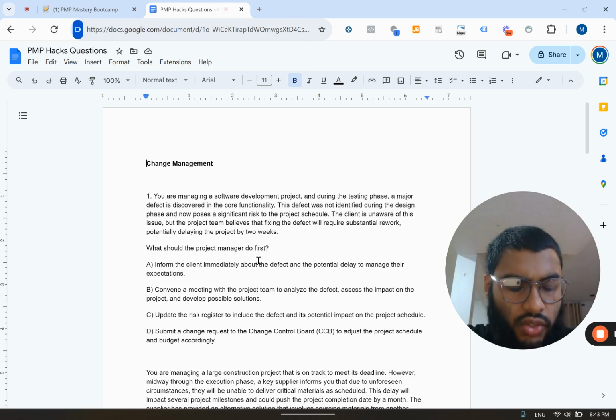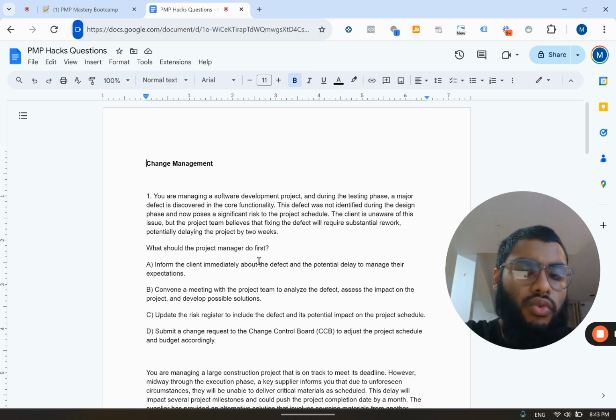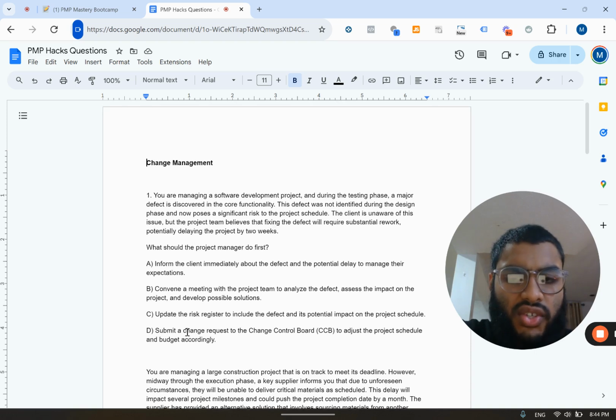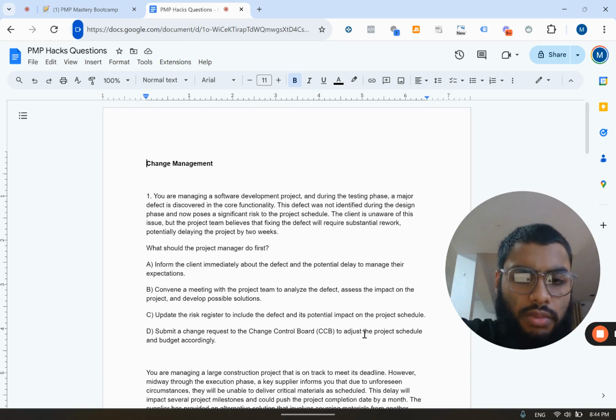So just from reading the answers, which answer do you think should be the right answer? You can pause this video and take a shot at it. But I would say the best answer is going to be: submit a change request to the CCB to adjust the project schedule and budget accordingly.